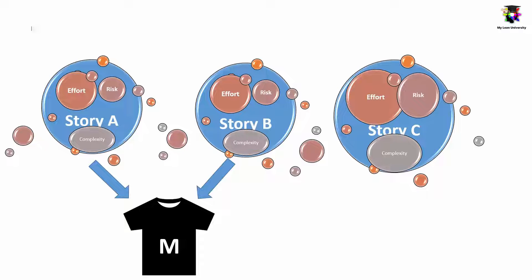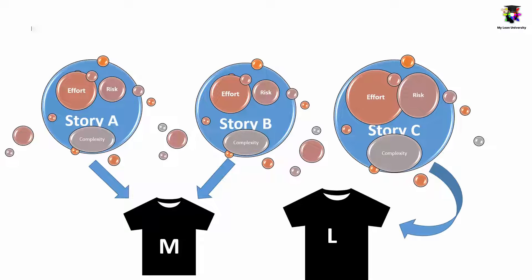The size assigning process is relative to each other. For example, if the function of complexity, effort, and risk or uncertainty for a backlog item is similar, it may be assigned a medium or M size. If another backlog item requires much larger effort, larger risk, and complexities, we can relatively assign it to a larger t-shirt group. So t-shirt sizing is relative to each other, which is the basic approach of every agile estimation technique. T-shirt sizing is relatively easy.